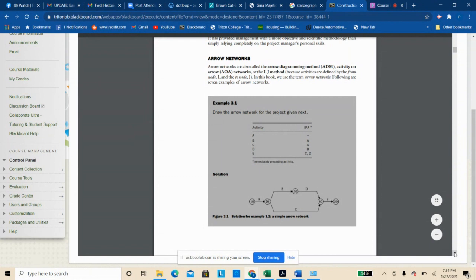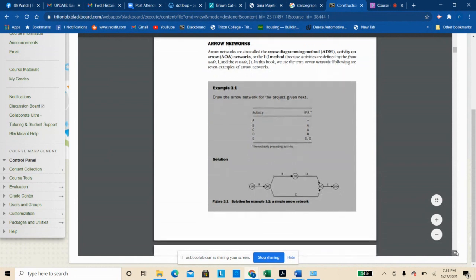When you get durations for activities A, B, C, and D, that's when you will be able to identify which one of these is the critical path. Does task C take longer than tasks B and D? That'll tell you when you get to that level. They don't really talk about it here, but often you're trying to establish critical path timing. Obviously, that's what we're doing here, scheduling.